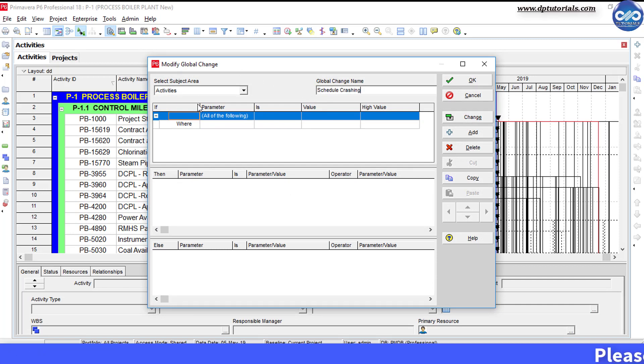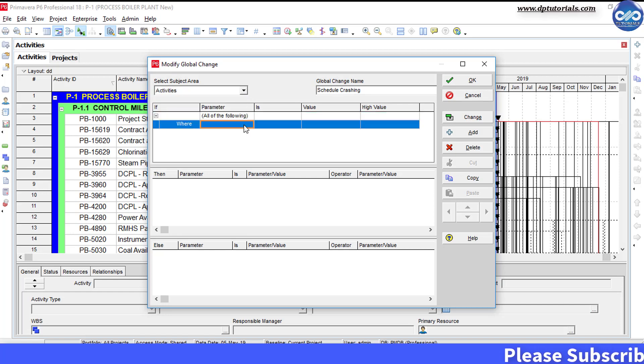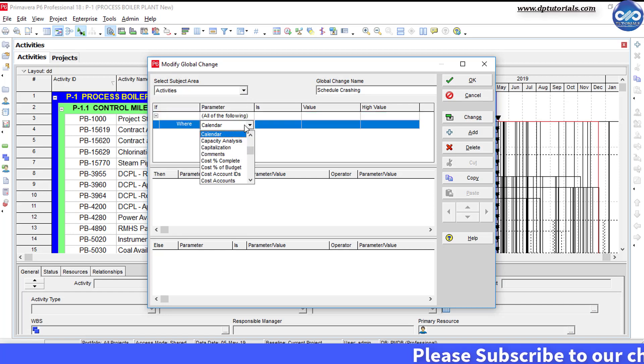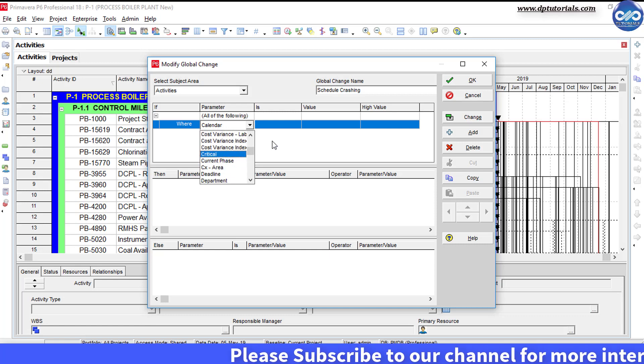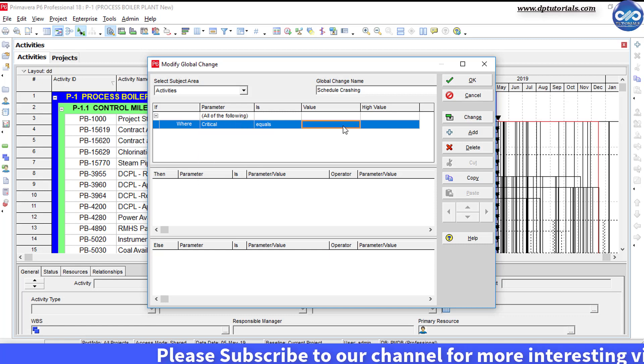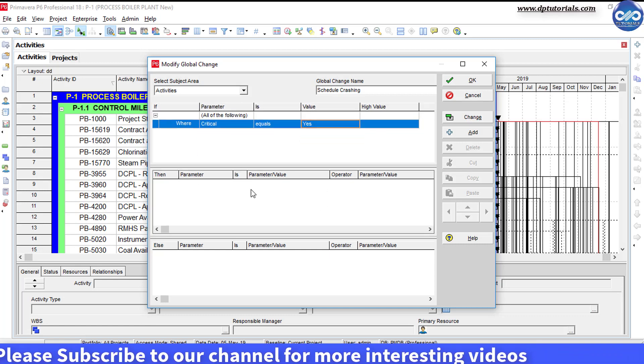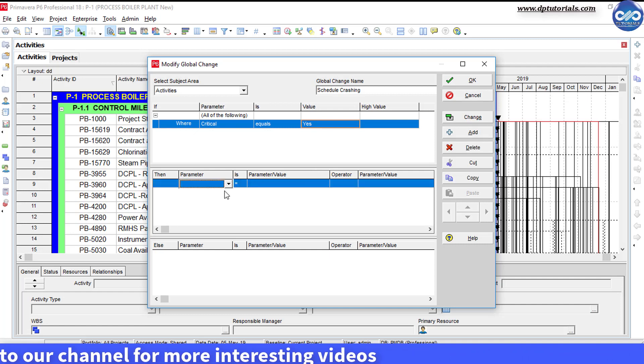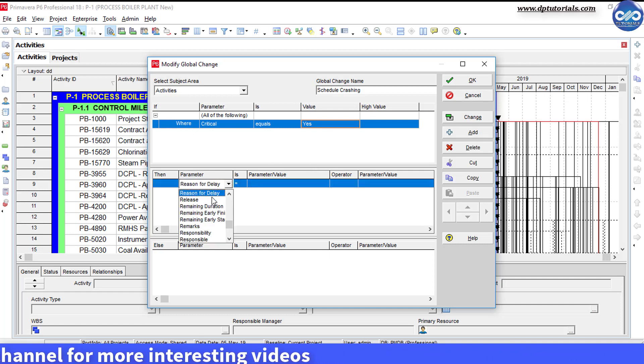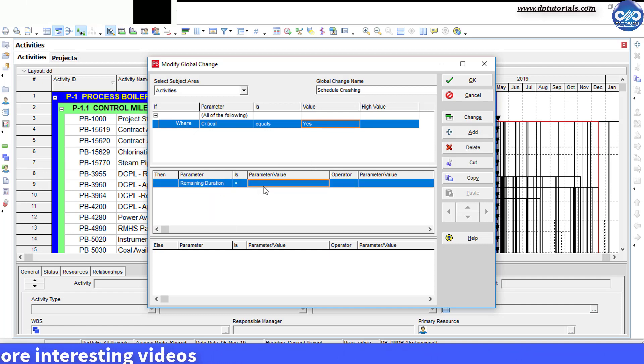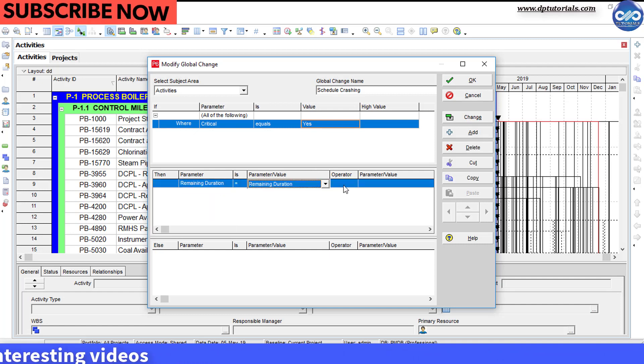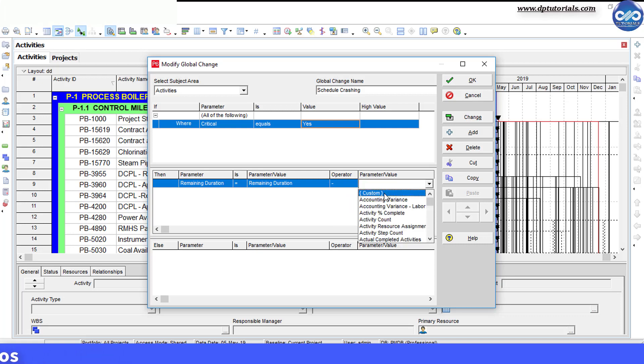Select subject area as activities and set the condition as where critical equals yes, then remaining duration equals remaining duration minus 8 hours.